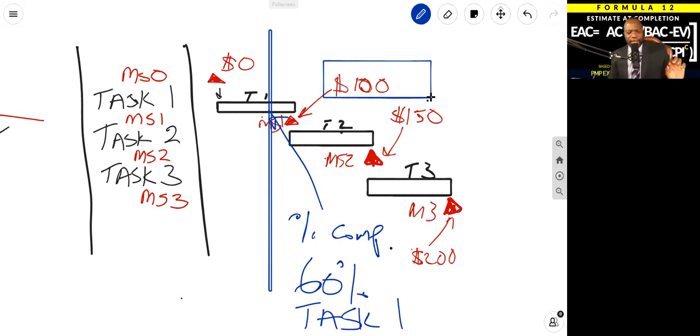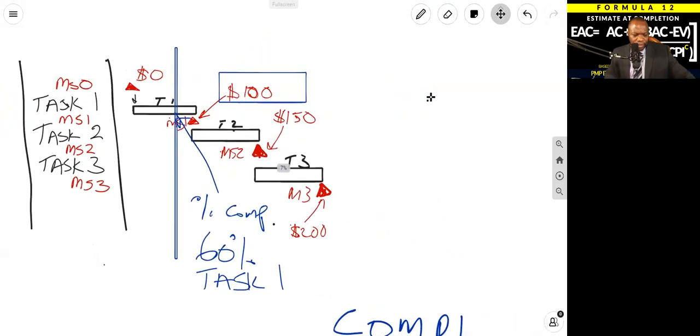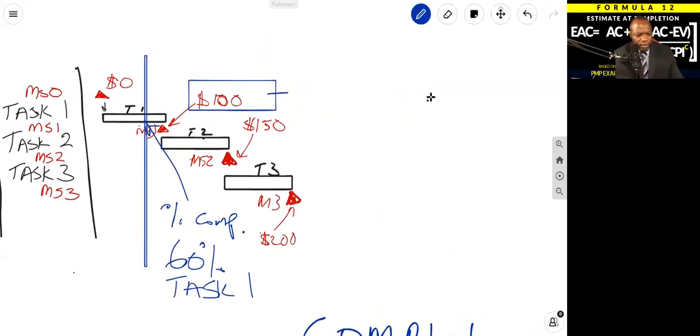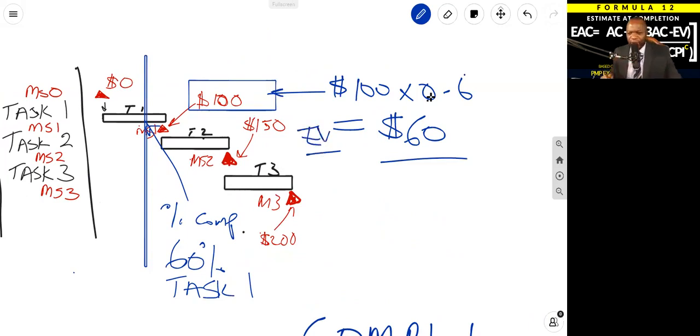If that was the case, we would multiply the $100 attributed to milestone one by 60 percent. So 100 times 0.6, and that would mean at this point in time, we can claim $60 for our earned value. We're talking about earned value in all of this, and that's pretty much how it works.